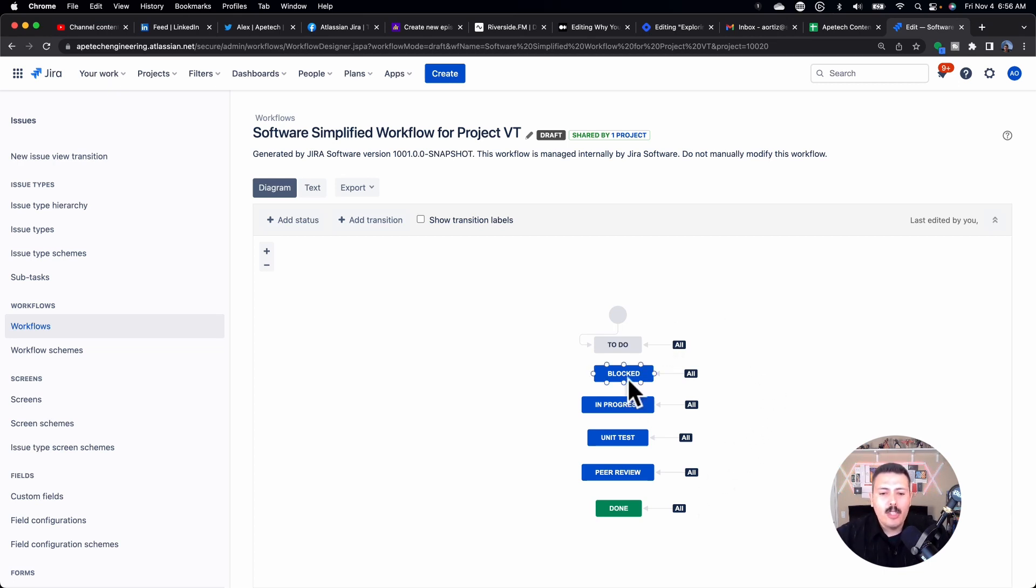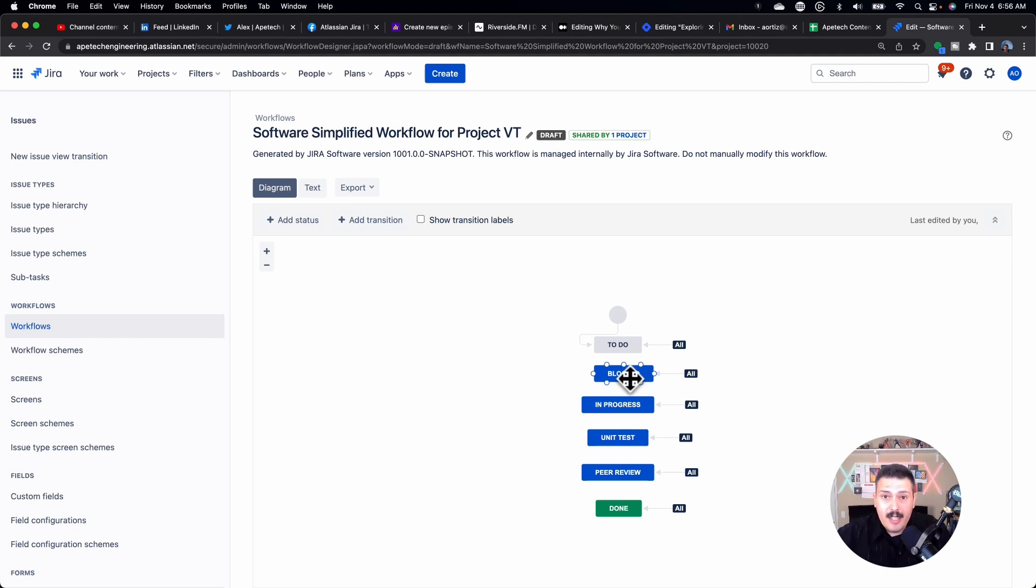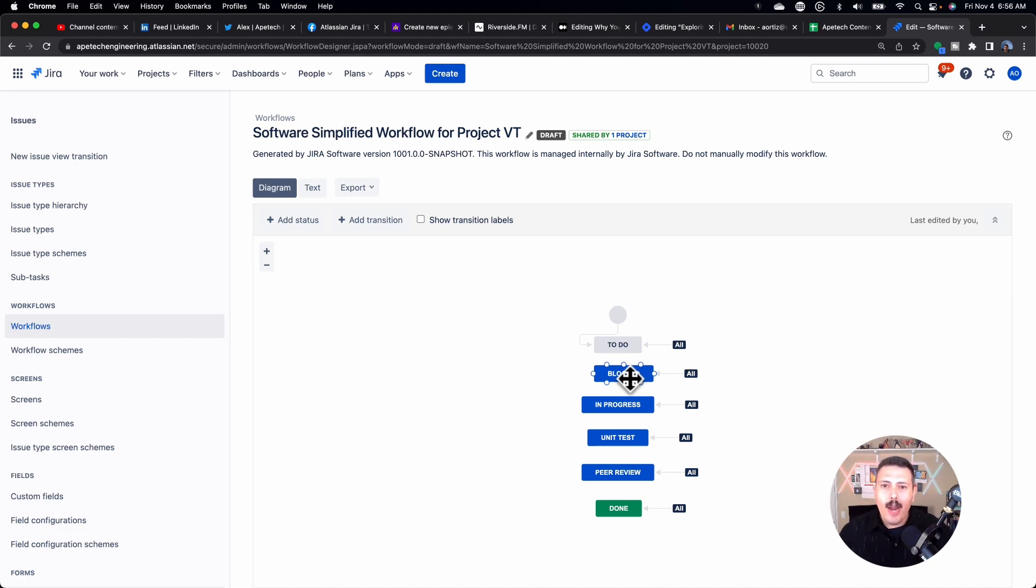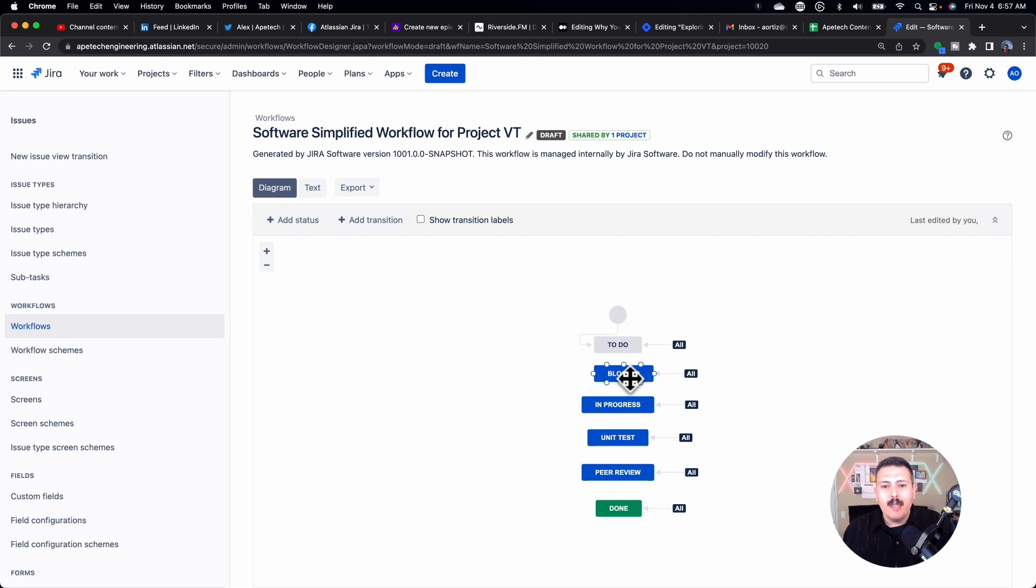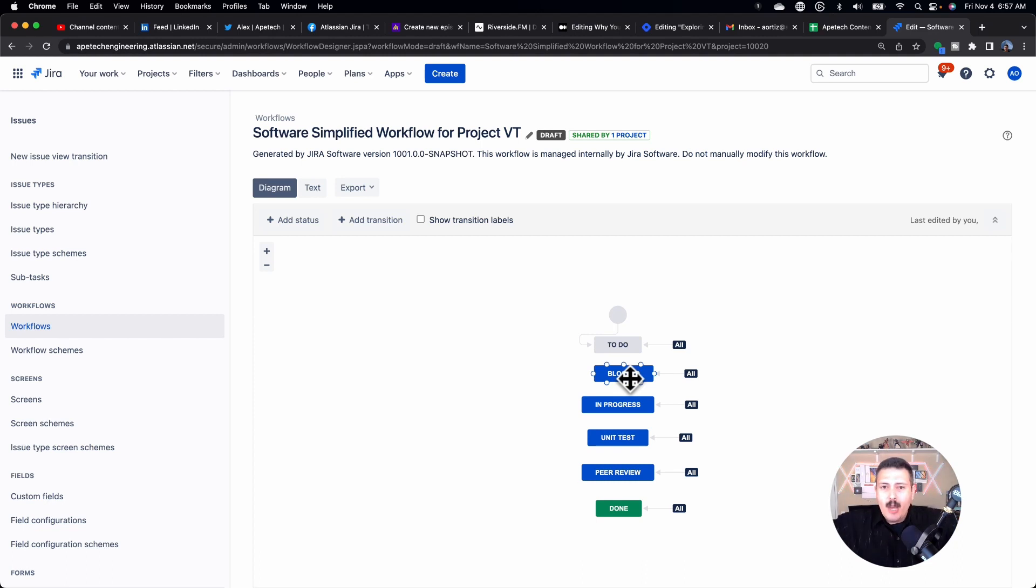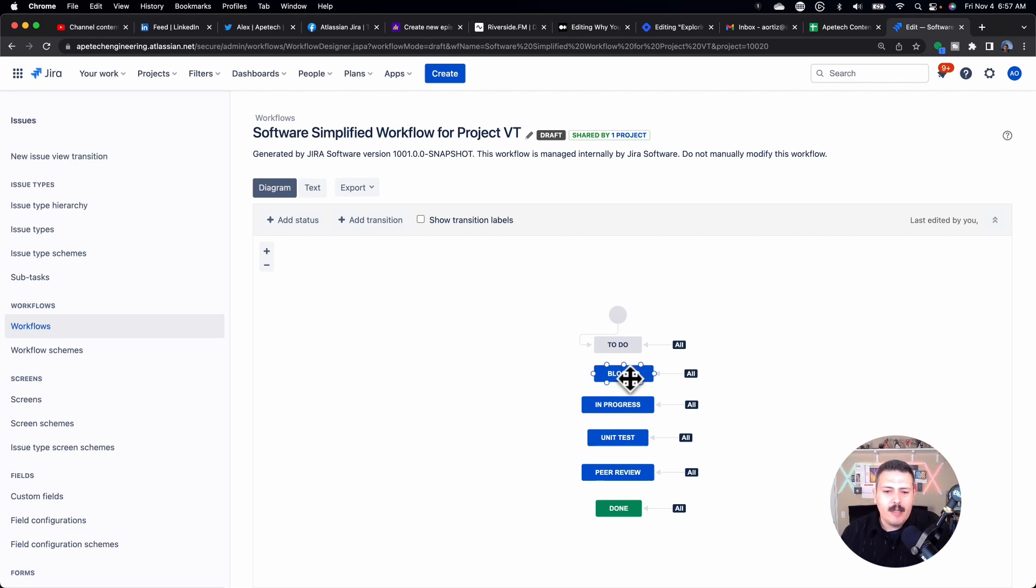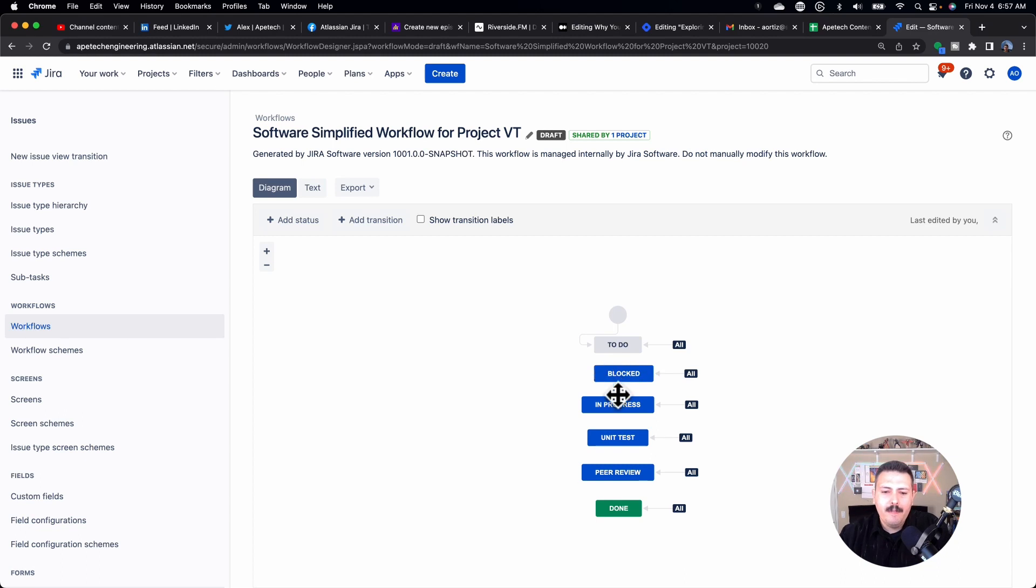The very first status that you should be adding is blocked. In your Scrum meeting, your daily Scrum, you have this topic of your impediments for your developers. Now, what better way to visualize what impediments your team has than by adding a column in the board that basically helps your team highlight those impediments. It makes it easy for your team, it makes it easy for your Scrum Master, and then when you get in the room with the decision makers, you have a list, a hit list of things that you got to basically tackle and resolve and mitigate those impediments. So add this status of blocked, very critical status to have.